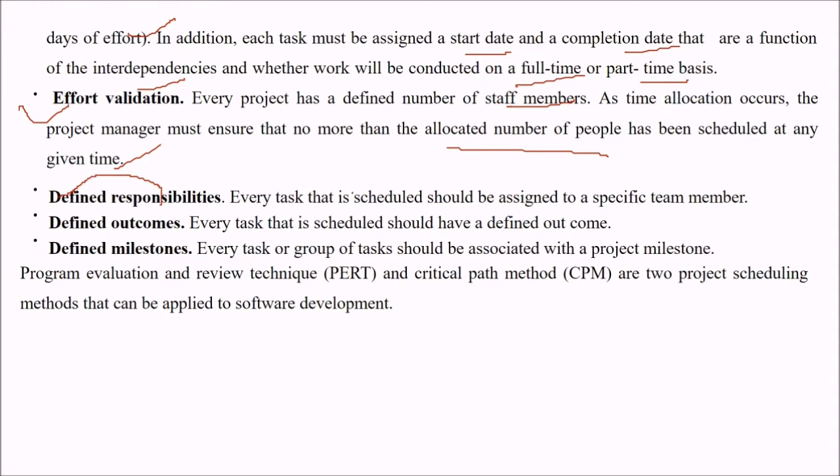Responsibilities need to be defined. Every task that is scheduled must be assigned to a specific team member. And defined outcomes means every task that is scheduled should have a defined outcome also. Milestones should be defined. Every task or group of tasks should be associated with certain milestones.